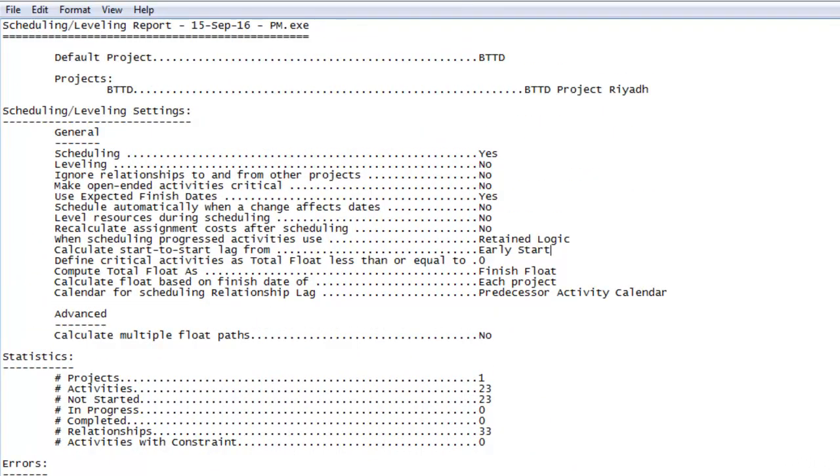So whenever you schedule a project, you must check the schedule log. Or whenever you import a project from any other planner, or for any project or new schedule, you must check its log which will give you some critical information regarding the schedule of your project.